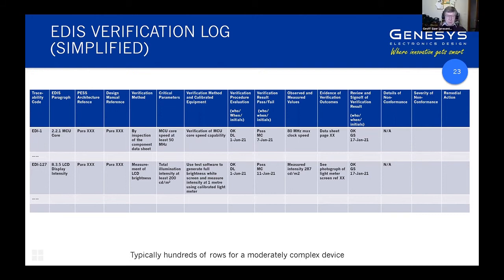Firstly, because your risk analysis will give rise to risk mitigation requirements that occur back in the system level, software level, electronics hardware level, mechanical level. So the risk mitigation process or risk analysis process gives rise to additional requirements, and there is an additional burden that if something is a risk mitigation measure, then it needs additional verification and validation to be undertaken to show that it's effective.